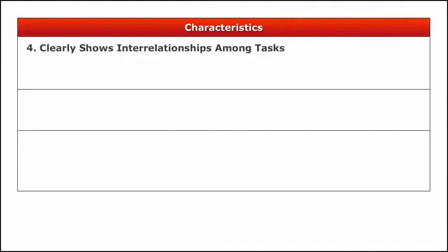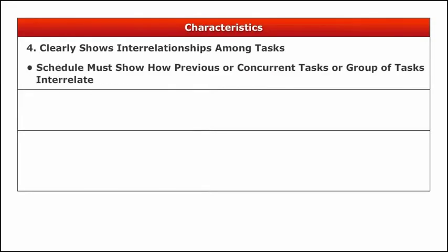4. It shows interrelationships among tasks very clearly. Tasks are never done in isolation, and most rely on information or results from a previous or concurrent task or group of tasks. Your schedule must show how these tasks interrelate.